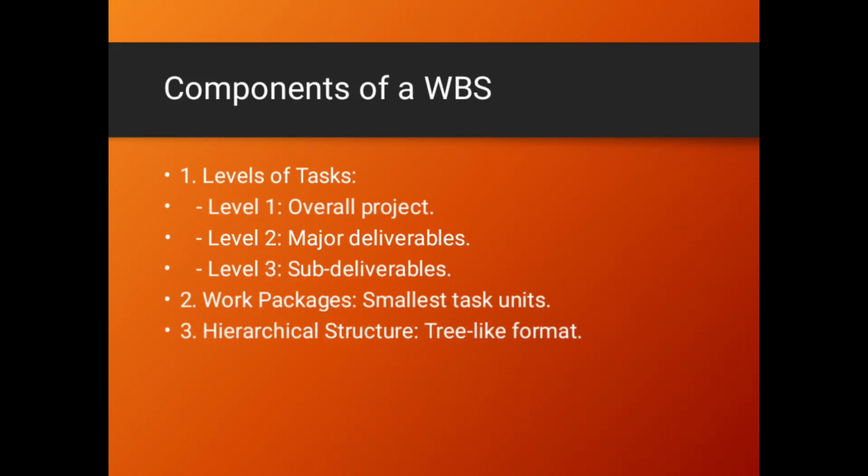From there, we need to understand that it has got a hierarchical structure. That is a tree-like format, in the sense that you start with something, the bigger project, whatever you're going to do, the umbrella project. Then you break it into major deliverables, then you break it into sub-deliverables. So you're starting with a big thing, then you are coming to something smaller, then you are going down to something that is very small. So it is hierarchical in nature. It looks like a tree.